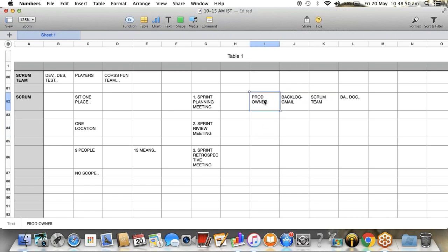Exactly. So once the planning meeting is done, in the planning meeting, once the product owner hands over the backlog to the Scrum team, now because we don't have a manager, the Scrum team's responsibility is to divide the work within themselves. They have to decide because we don't have a manager. If there is a project manager, then the project manager will do the WBS, the work breakdown structure: BA does this job, designer does this job. But here, there is no manager, only a Scrum master. That person is not a manager, he is a coach. So the Scrum team as a whole has to decide.